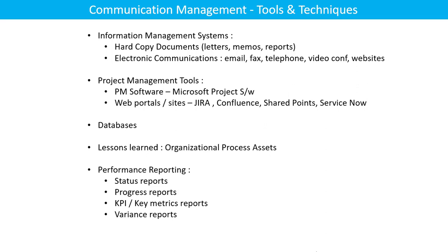We also update our data in the databases. Lessons learned, like organizational process assets, OPAs, which we call. Lessons learned is the way we are managing the projects, the different issues being faced, and the way we are handling those issues using different change requests and change logs. Whatever lessons we are learning, we will keep them for our future projects in the form of OPAs, organizational process assets. So any corrective actions we have taken, any preventive actions we have taken, any proactive measures we have taken in order to ensure that the project is a success, we'll keep documented in the form of OPAs, and it is called lessons learned in this particular project.